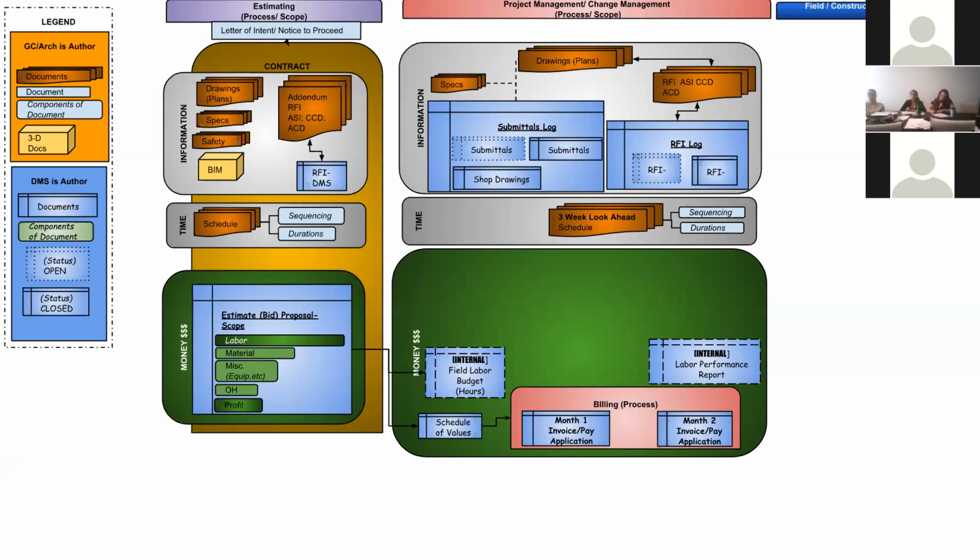Now, when we talk to our guys in the field, I say, look, how much longer is it going to take for you to do this, or what's referred to as your cost to complete? They will say, oh, I need another 60 hours in order to complete this amount of work. Well, we only had 100 hours in the budget. We've spent 60, and they want another 60, which means that we are going to be 20 hours over budget, which means that we are going to spend more money than we had allocated.